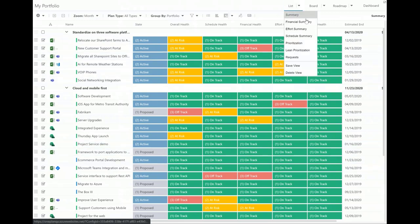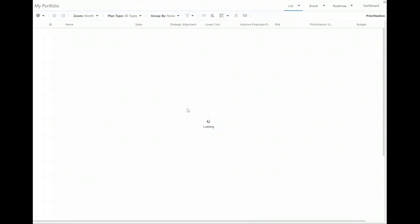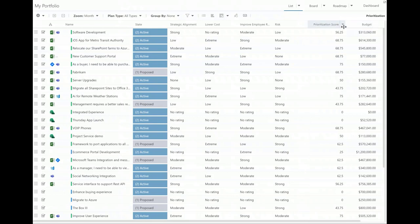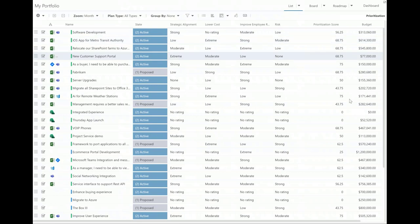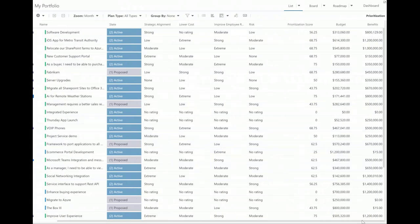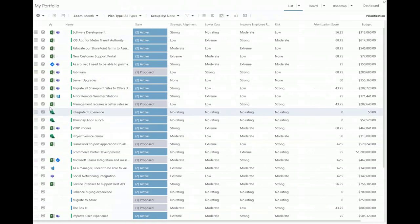Now I'm here on the portfolio view. I'm going to switch my view to the prioritization view. On my prioritization view, you can see the different metrics we might be tracking. In this case, we have it set to a more traditional scoring method instead of WSJF — using things like strategic alignment, how much this is going to help lower costs, employee retention, and risk to generate a prioritization score. But I can also include other things in my view — like budget and benefits, or financial metrics like IRR, NPV, or ROI — whatever I might want while making these prioritization choices.